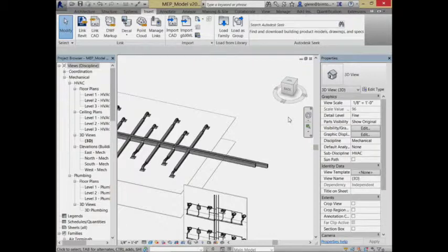So it'll be their meeting in their trailer where they get everything together. But that's why it's very important for design to get contractors involved early in the design process, as part of a whole integrated design process as opposed to just bidding on things after they've already been designed. It really helps the process.